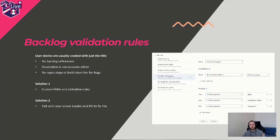There are different solutions. For the process, you need to talk with your scrum master and product owner to set up backlog refinement meetings. But if you look at the tool, in Azure DevOps you can create custom fields and custom validation rules. For example, I created rules so that when I move something to the 'In Progress' state, the Effort, Acceptance Criteria, and Assigned To fields become required. With all the states, when you're about to change the state and something wasn't ready, all the fields became required — and if developers didn't know what to fill in, the work wasn't starting.